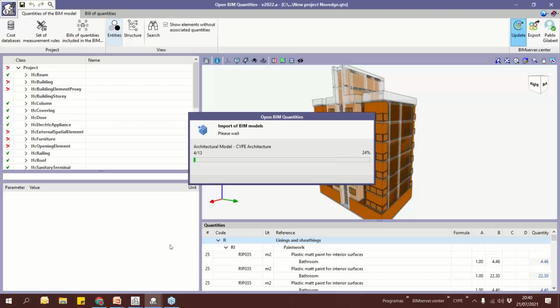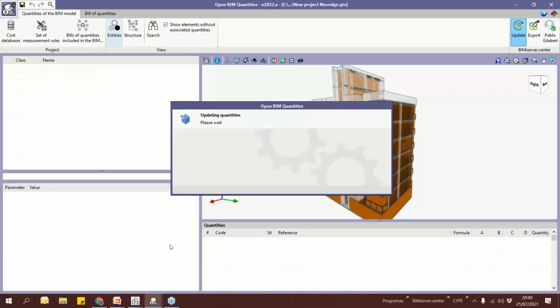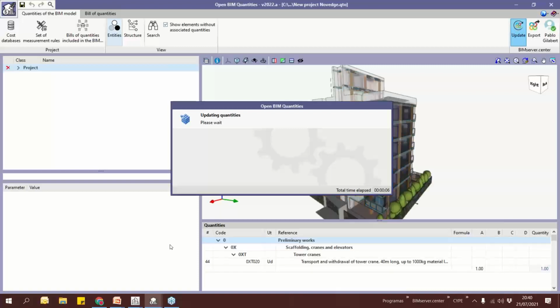In order to specify some filters, you can reuse some filters that we have already used in the different examples you can find in the project, in the software. But you need to adapt it to the way you work. Once you have defined them, you can reuse them in all the different projects. So you just have to come here to import this data, to make this connection with your rules, and to export and generate the bill of quantities.